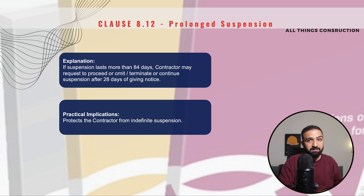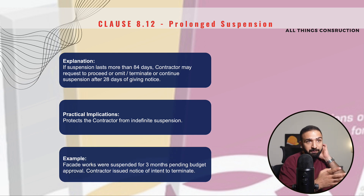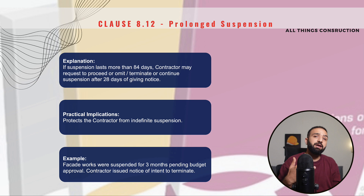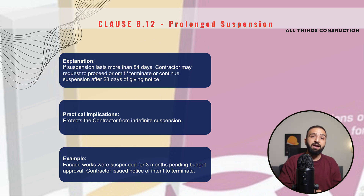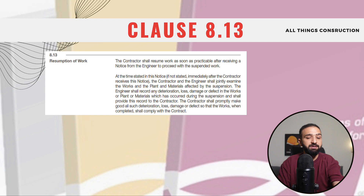This is a fairly important clause — it is meant to protect us contractors. For example, if we were doing facade works in a building and those works were suspended for three months due to employer budget issues, we contractors will issue a notice to terminate. We will tell the employer and the engineer that we will build the building, but we don't want to do these facade works anymore as a result of suspension under clause 8.12.